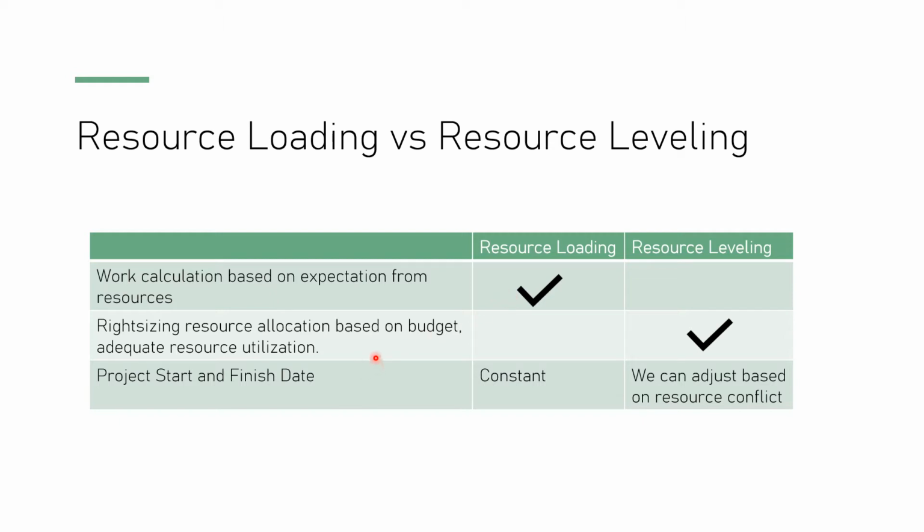Right-sizing resource allocation based on budget and adequate resource utilization, that is resource leveling. The project start and finish date is constant in case of resource loading. In case of resource leveling, we can adjust based on resource conflict.